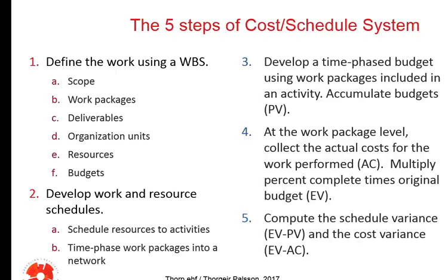Then we put time-phased work packages into a network, with the cost of each work package. Remember time units and the cost items in each box. The accumulated cost gives us the baseline, the total cost of the project, which is done here in stage 3.